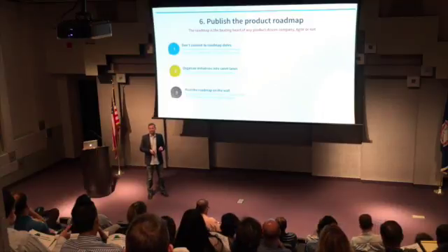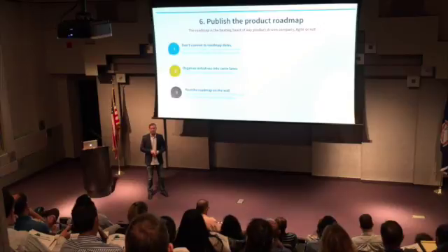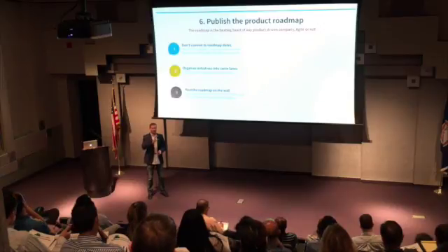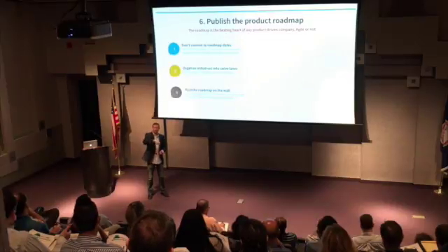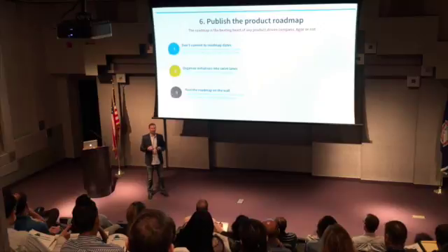I mean, if you're trying to make it a product-driven company, what that means is you have to respect the fact that marketing and sales and customer service and everybody else has to staff based on what's going to be coming in the product, right? So you don't want to hire your head of European sales if you're not going to be internationalizing the product in time to go get that done.